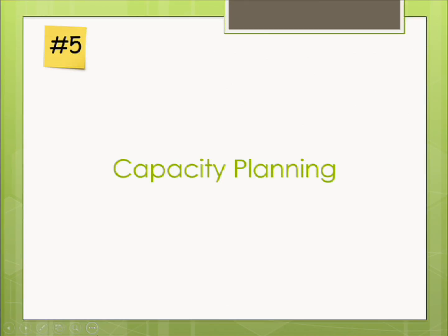We like to have them all estimated before and have the business prioritize them. So when we walk in here, we're just trying to figure out how much time we have, and then we're going to take whatever tickets are the highest priority. Otherwise, you waste all this time trying to figure out what the highest priority is, and you don't have the answers, and you waste a lot of people's time. So this is where you say, okay, who's got time off coming up? Does anybody have any all-day weird meetings?